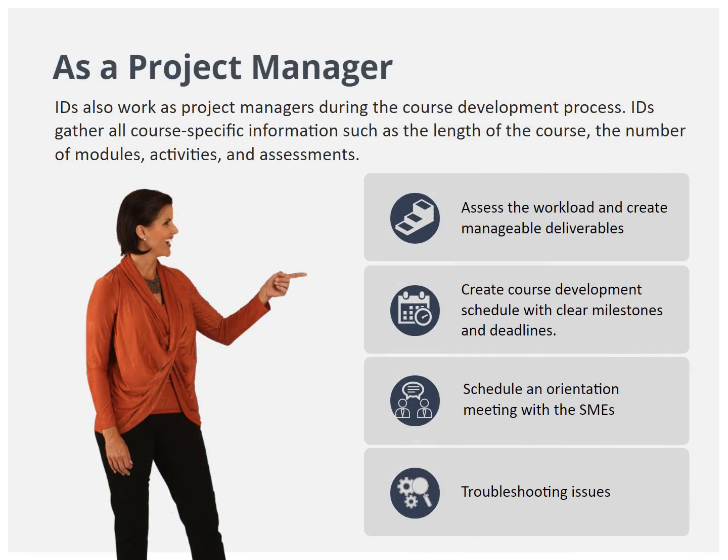IDs also work as project managers during the course development process. Your role as a project manager is to gather all course-specific information such as the length of the course, the number of modules, interactive activities, and assessments. Also, is there any multimedia content development, and if yes, how many? These pieces of information will set the stage to assess the project workload and create manageable deliverables. It will also help you to create a reasonable course development schedule with clear milestones and deadlines.